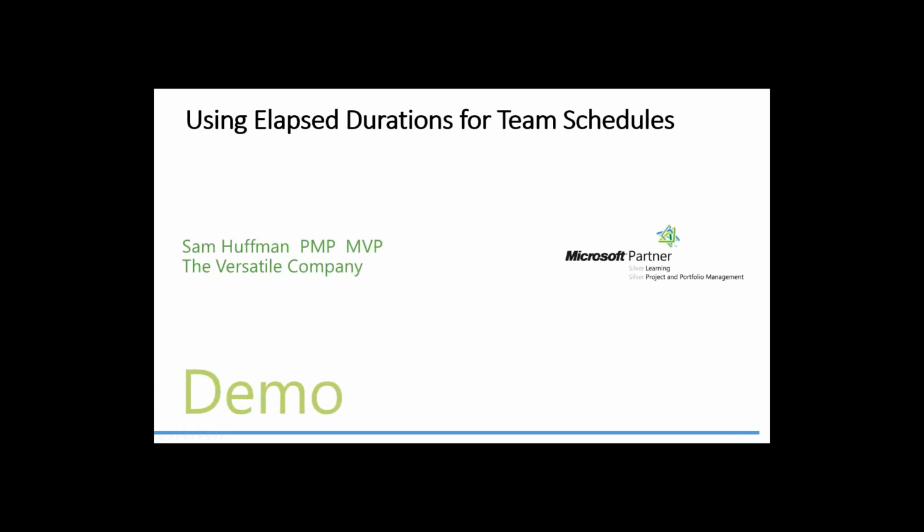an elapsed duration. You know, or should know by now, that when you put a duration or assign a duration to a task, that is working duration, meaning working days. So if you had, for example, a 2-day activity that started on a Friday, you would know that it would finish on Monday the next week. That would be a 2-day normal duration.